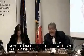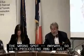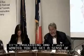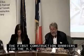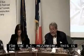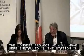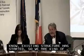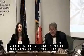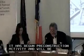Anyway, it's proceeding, and I just wanted you to get a sense of where we are. The first construction barriers for the AC mezzanine, the longest project, were installed in the station in October, and surveying of the existing structure has started, so we are readying ourselves for actual construction. The 405 station rehab contractor has begun pre-construction activity and will be fully mobilized at the site in December.